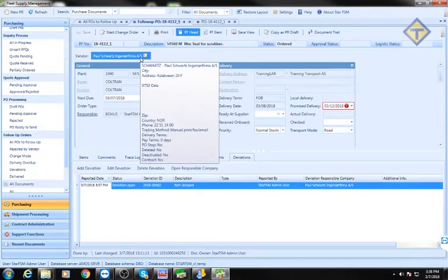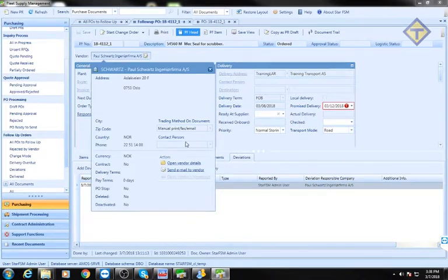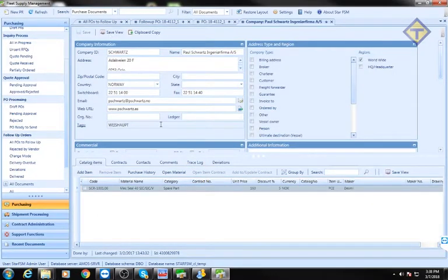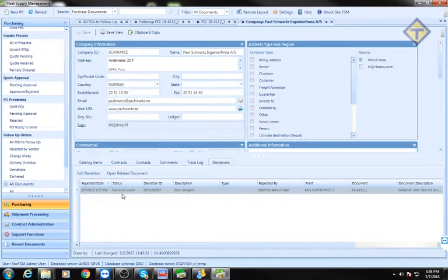So that means in the future, if I open this vendor, where we have all the information about this vendor, I can see all deviations this vendor received and what PO this deviation was referring to. So here I have a deviation count, that's the number of deviations. So you can create some kind of quality score and give a score to a vendor.